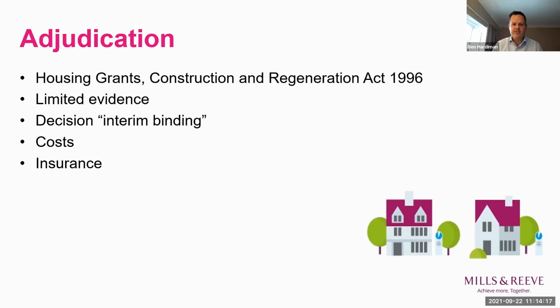And the responding party has 7 days to serve a response. So it's possible to agree to extend that, but it's ultimately at the discretion of the adjudicator to do so. The referring party will often have permission to serve a reply within 3 days. Now, these are the bits that create the issues.